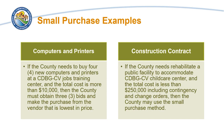If the county needs to buy four new computers and printers at a CDBG-CV jobs training center and the total cost is more than $10,000, then the county must obtain three bids and make the purchase from the vendor that is lowest in price. If the county needs to rehabilitate a public facility to accommodate CDBG-funded child daycare services and the total cost is less than $250,000, including contingency and change orders, then the county may use the small purchase method.